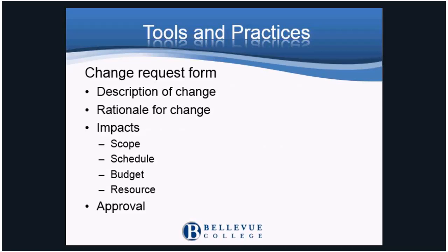This needs to include the description of the change and the rationale, as well as the changes that need to occur for the scope, schedule, or budget, and any adjustments for the resources. Then this is approved by the sponsor and any other necessary governance.